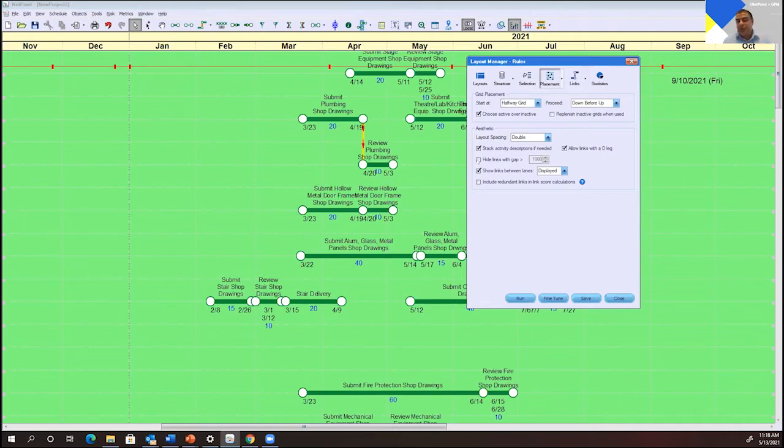And do you want to show links between lanes? Again, you can control that. Those are more like interdepartmental links, or if it's a WBS kind of link, maybe it has some value, maybe it does not, because of how it is. And we introduced with Autograph a new algorithm to automatically identify redundant links, so you can factor those out completely from your layout.